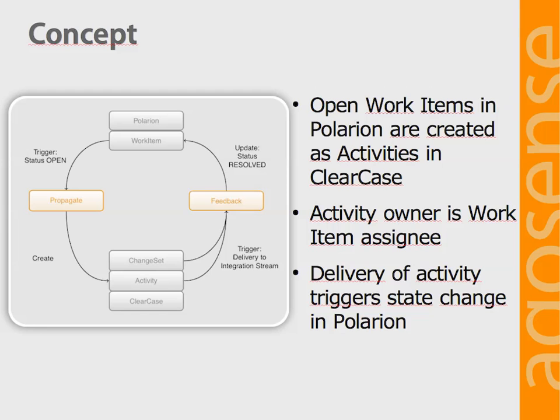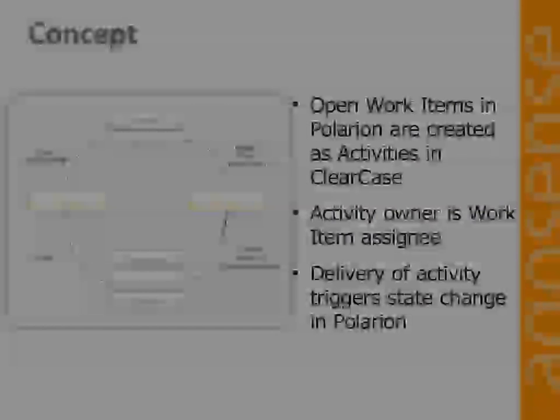The propagation process is triggered by the creation of a work item in Polarion and ensures that a corresponding activity in ClearCase is created and assigned to the right user. Once the activity is finished in ClearCase, the work item is put in resolved state and all attached change set information is stored with the work item.